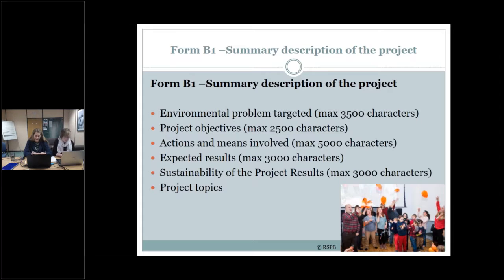We recommend to undertake a logical framework approach for this area, which is an analysis. It's a project management tool analyzing the environmental problem, crystallizing the objectives and the action and means and how you get there. The logical framework used to be mandatory for LIFE applications in the last LIFE program. It's no longer required, but we still recommend our applicants to undertake the logical framework analysis because it helps them to distill exactly what the problem is, how they want to tackle it, and where they want to be in 5 years' time at the end of the project.